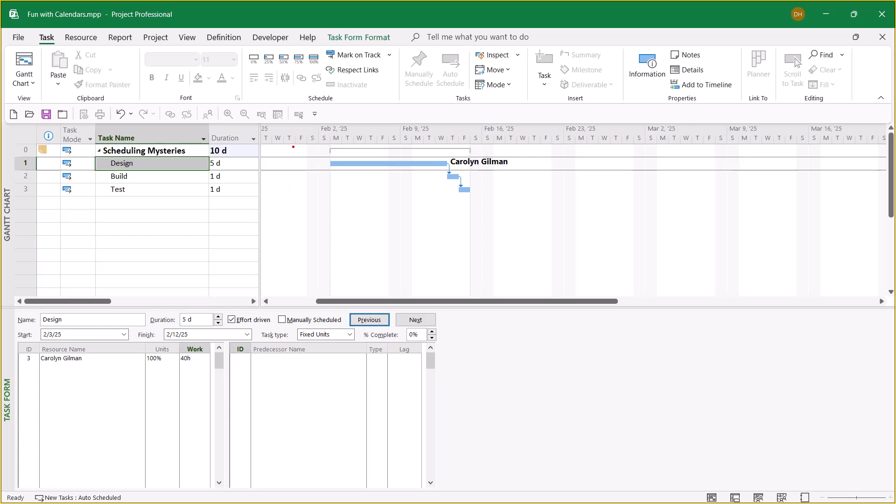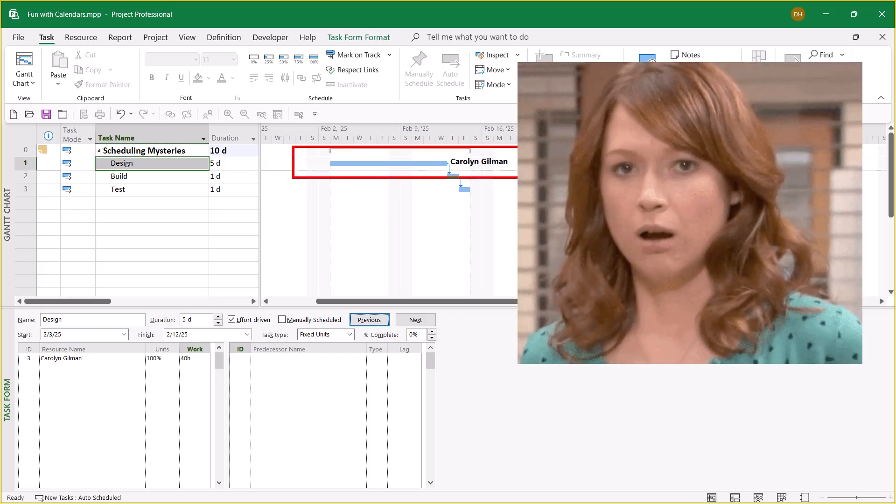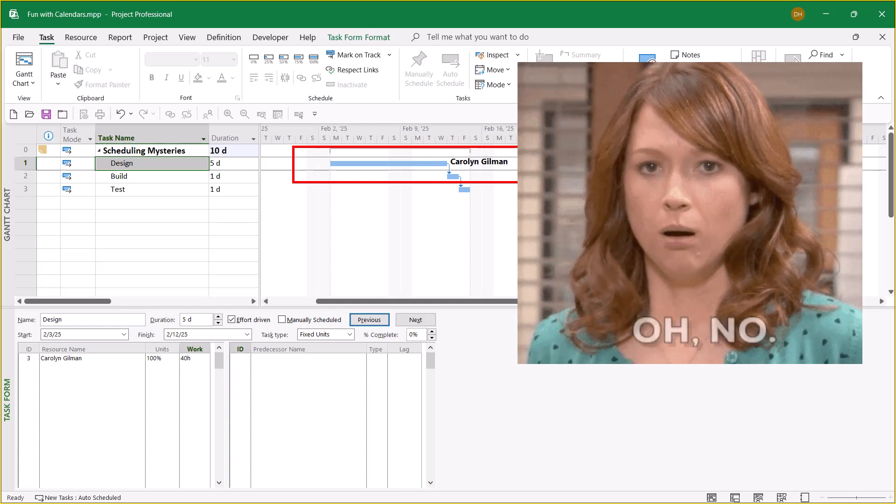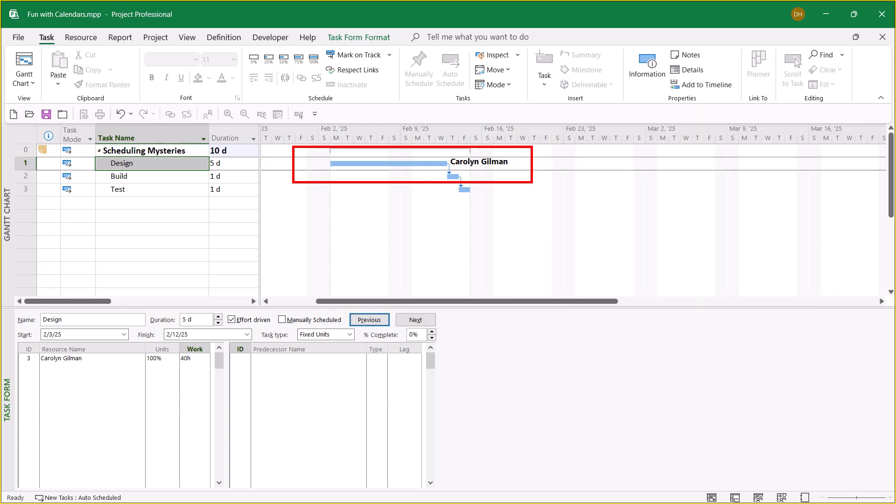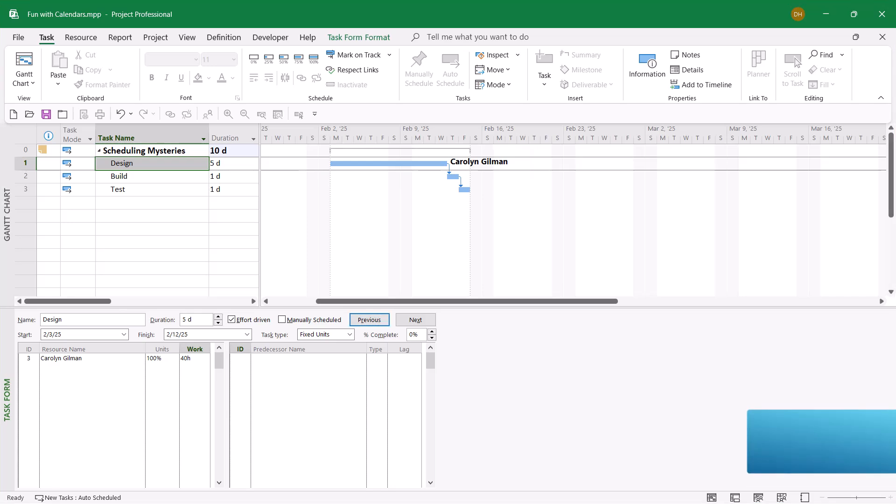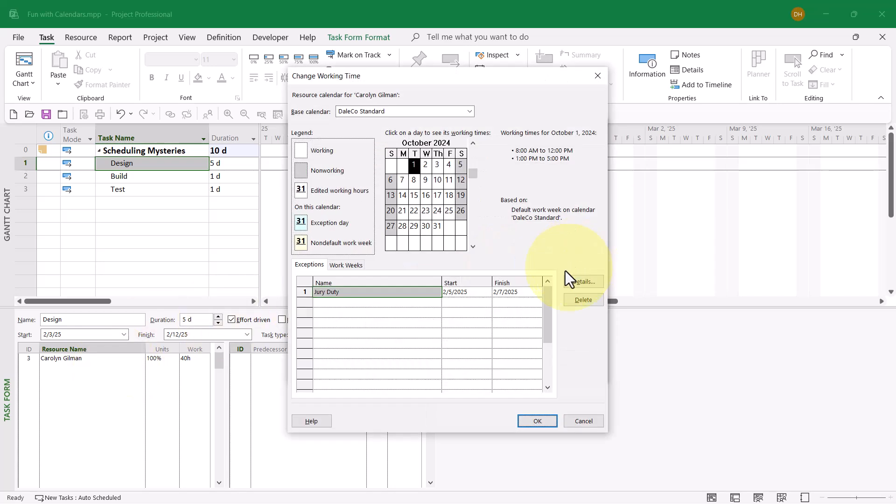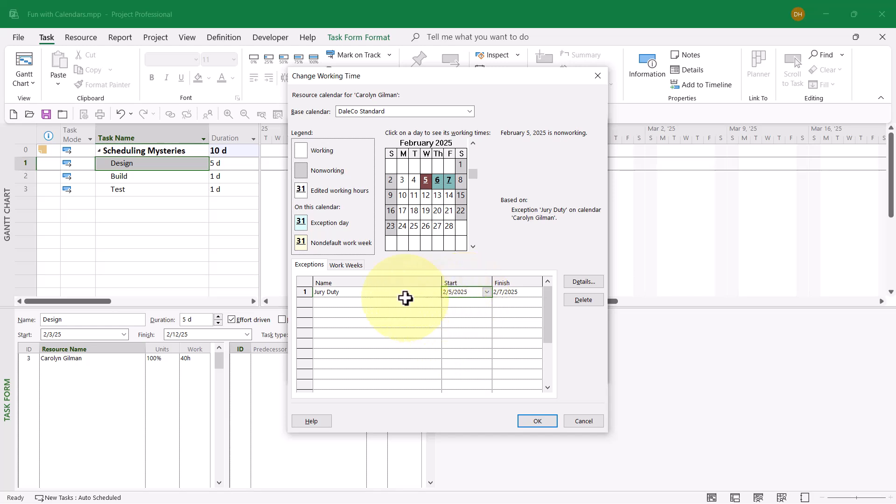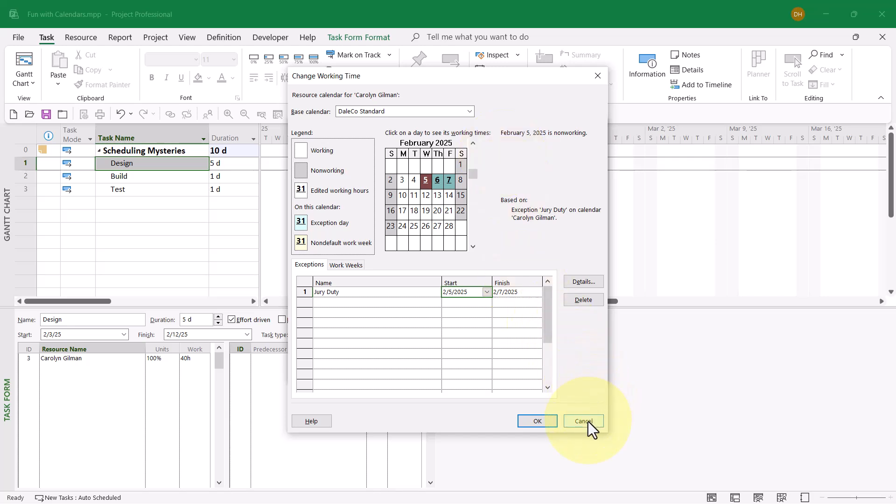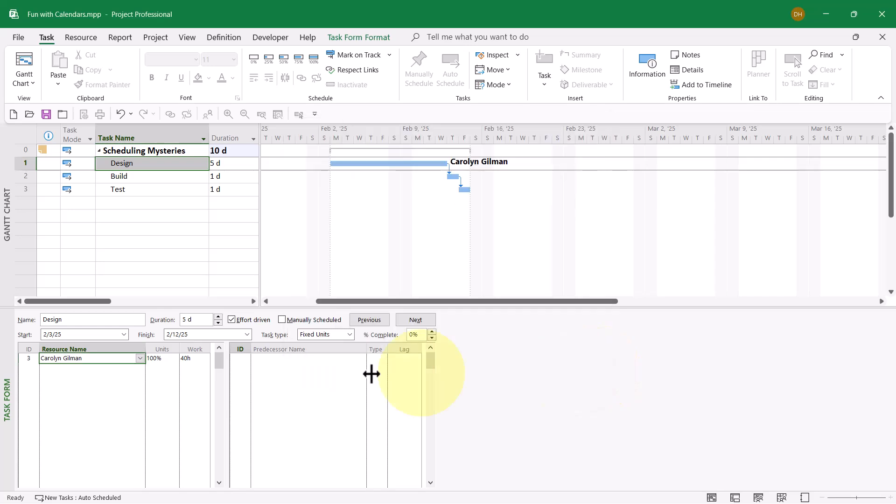However, now we've got another weird scheduling issue. Notice Carolyn is working five days out of the first week and three more days out of the next week, but the duration is still five days. What is going on? I'll double-click the name Carolyn Gilman and go to the Change Working Time dialog. Oh no, Carolyn has jury duty Wednesday, Thursday, and Friday of the week of February the 2nd. That's impacting the schedule of the task.